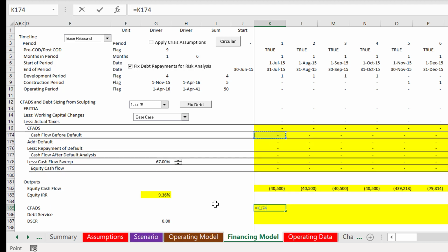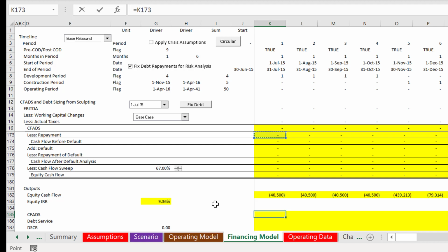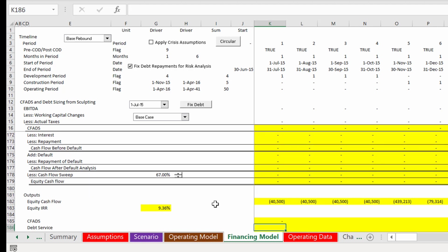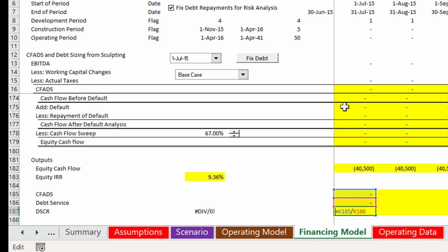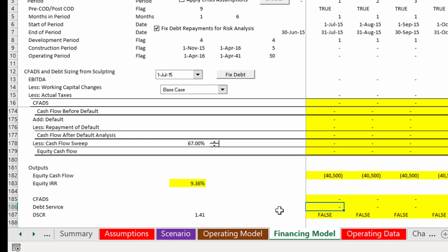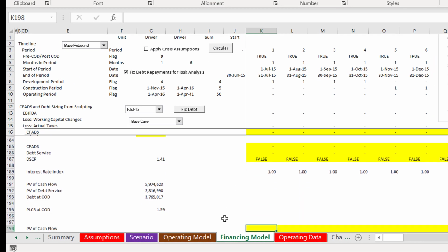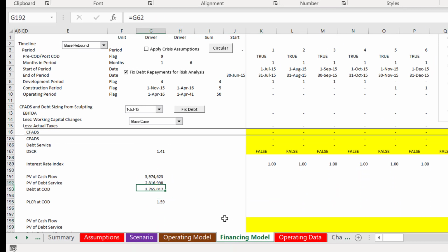Okay. Then we can get our DSCR, which is just straight from the CFADS up here. And we can put in the debt service, which wouldn't you just put in the scheduled debt service? Scheduled, you wouldn't put the sweep in because that almost would define it. Then you divide by that, and you get a divide by 0 error, so you go up to the denominator, put a greater than sign and 0.1, then a comma, and make sure it's false, so then you can get the minimum. I thought I was done, and then you can get the NPV of the cash flow.